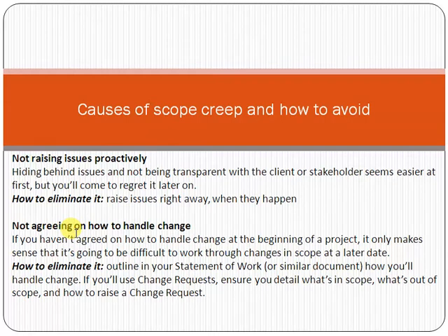Not agreeing on how to handle the change. Friend, it is necessary to have change request management: if anything is not coming under the boundaries of the scope, it should be handled through the change request procedure. So the CR or change request procedure should be properly documented in the scope document, and the management, and the customer especially, should understand that if anything is not part of the scope and they want to add it into the scope of work, it should be managed only through the change request.